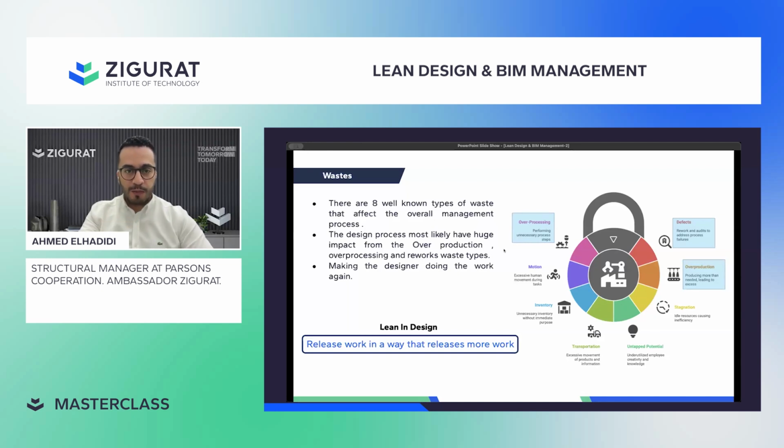No. Most of people are saying no. Yes, he cannot wait, because waiting will cost me indirect cost, because this contractor will have equipment, a lot of items on site, and he will cost me a lot. So continue as the design is received. This is a very good answer. But again, the design is working in a traditional way. This is the exact problem. This is the importance of lean.